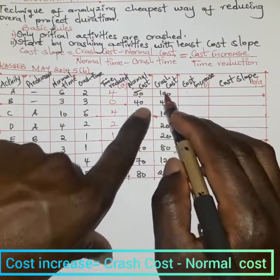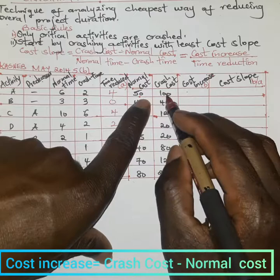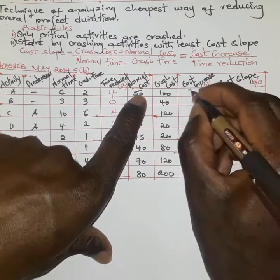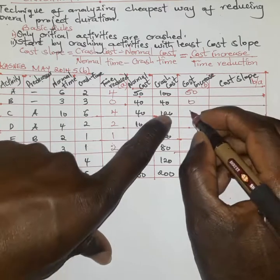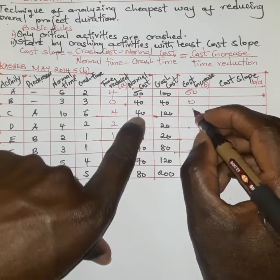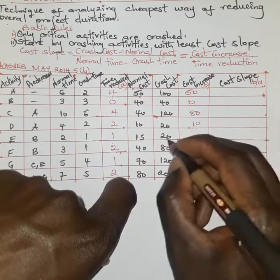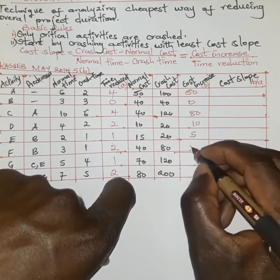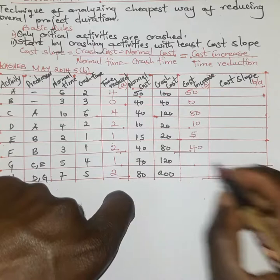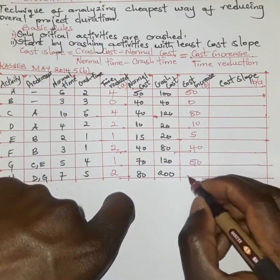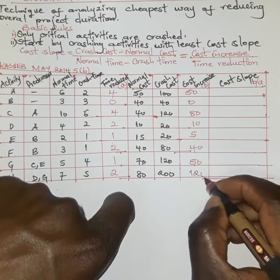For activity A, the cost increase is 100 minus 50, which is 50. Then we have: 40 minus 40 is 0, 120 minus 40 is 80, then 10, 5, 40, 50, and finally 120.